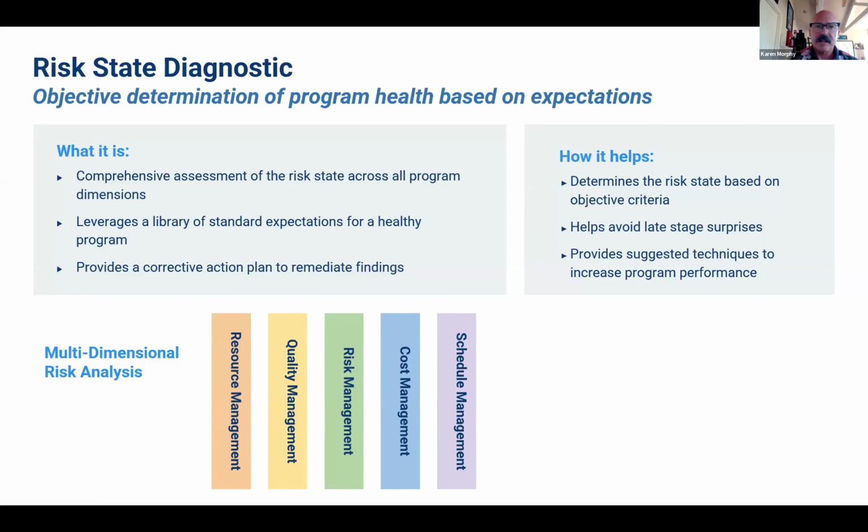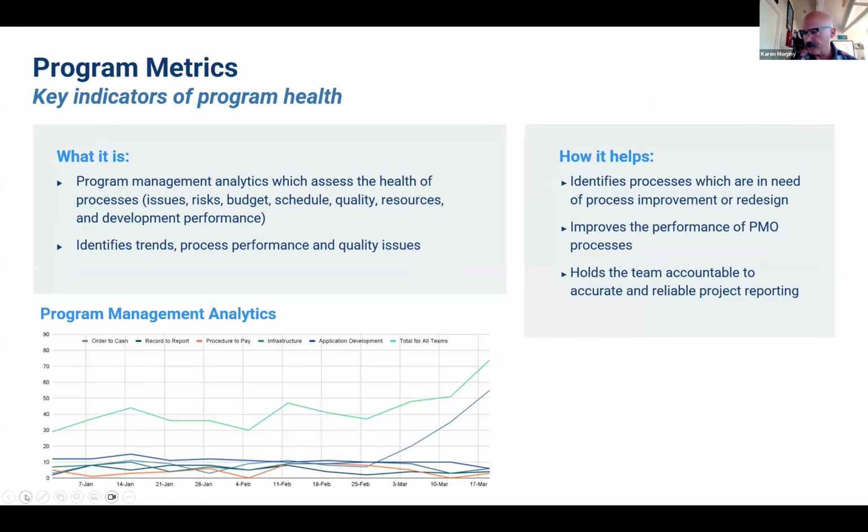I recommend this diagnostic be used on a regular basis, usually once during every program phase as a good rule of thumb. But you want to give the new phase time to break in the new processes and settle in before you use this diagnostic. And Ray, just interrupt if there are any questions.